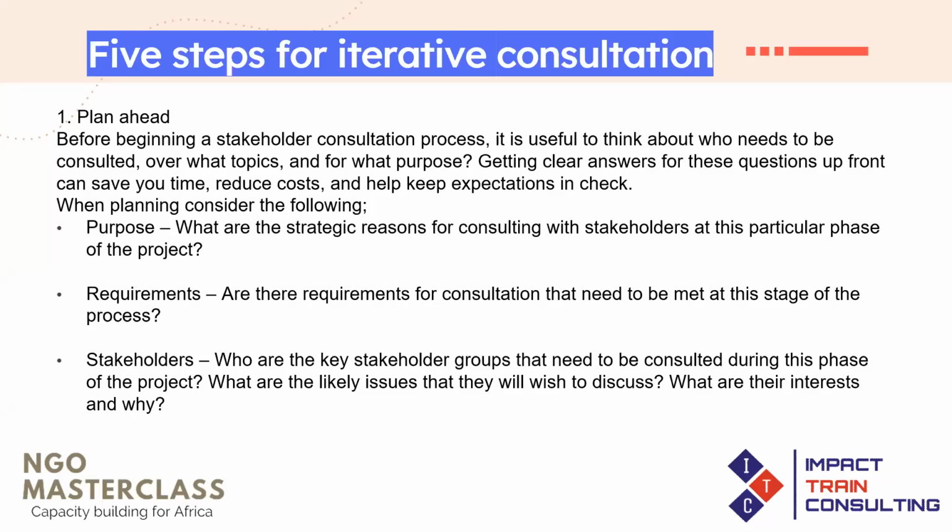And then you need to think about the stakeholders. So here you'll be asking yourself, who are the key stakeholder groups that need to be consulted during this phase of the project? What are some of the issues that they will wish to discuss with us? What are their interests and why? You may have known their interests when you did the analysis, but you also need to anticipate so that people will not ambush you and make certain demands that you're not prepared for. So you need to think about what would be the likely things that they will desire. What are some of the things that they may be expecting from us as we go on these consultations with them?